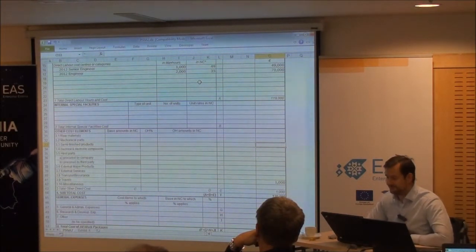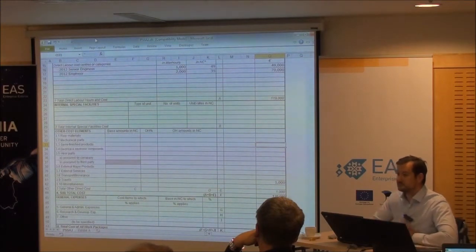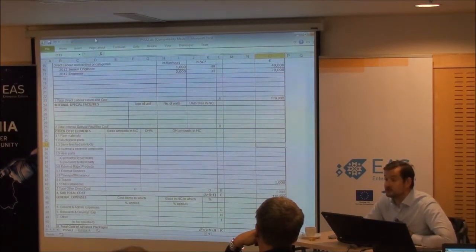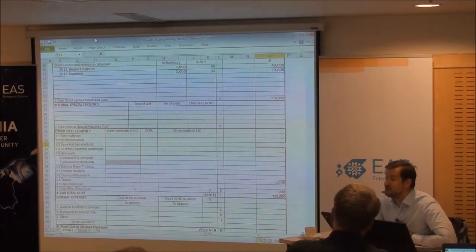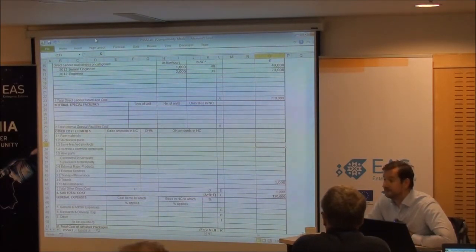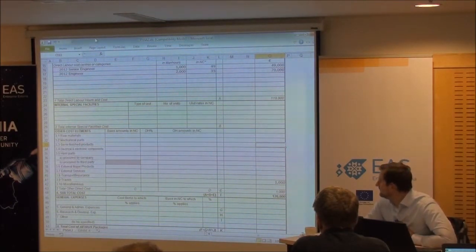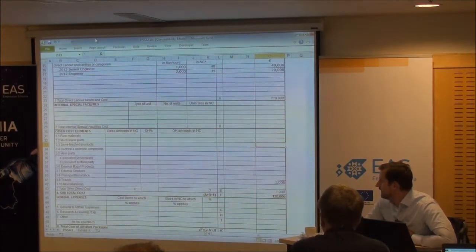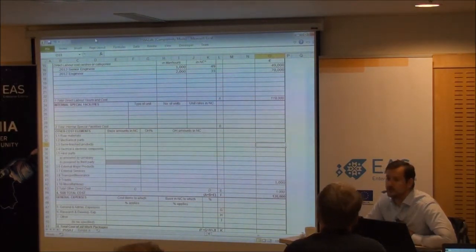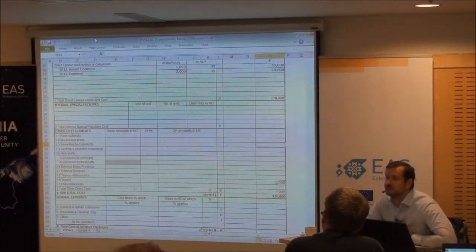Sorry, what's the profit margin? Like, where does it come from? Or do you usually assign a percentage? It's usually defined quite often. Oh, it's defined. Yeah. And it varies from type of contract to type of contract. 8% is typical. And that's right across here, so all the primes are under a similar condition. Some contracts, this can be even lower. Manpower contracts can be maybe 4%, because it's almost guaranteed work for a long period of time.